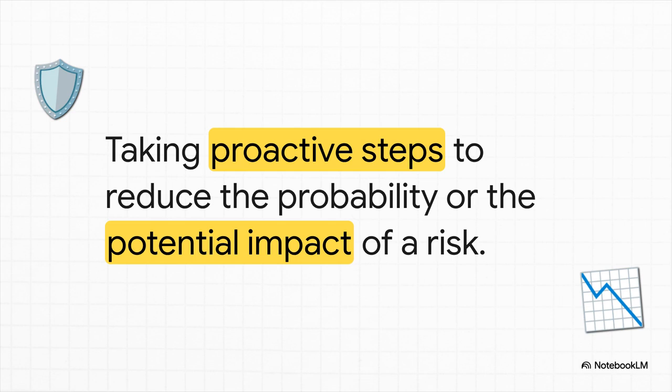Next, and this is probably the one you'll use most often, is to mitigate. Here, you can't get rid of the risk completely, but you take smart, proactive steps to make it less likely to happen or less painful if it does. This could be anything from doing extra quality testing to providing more training for your team.